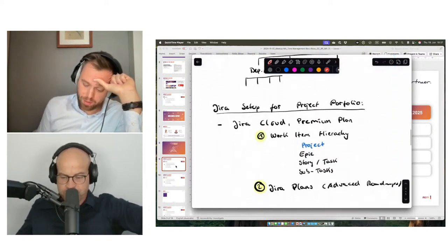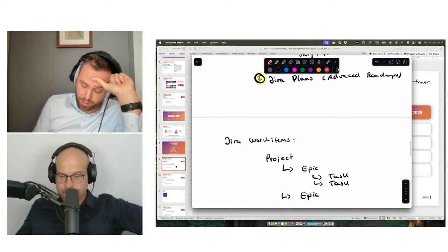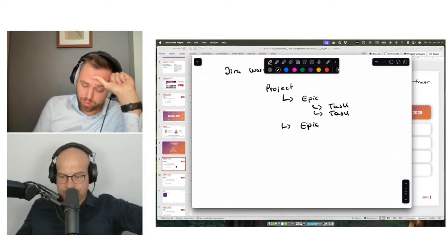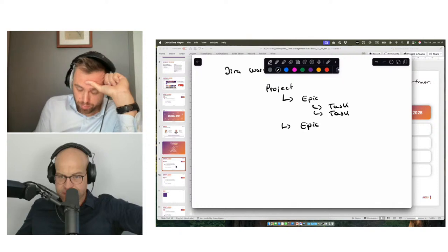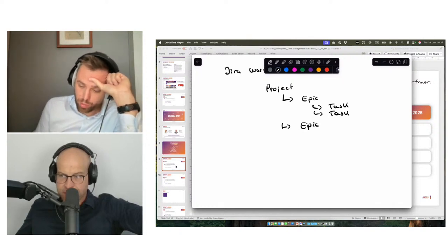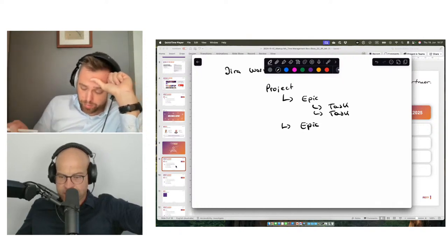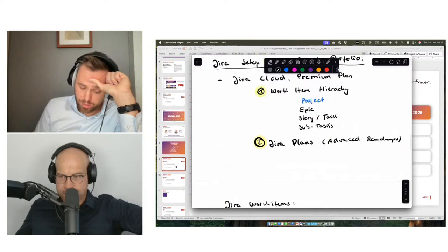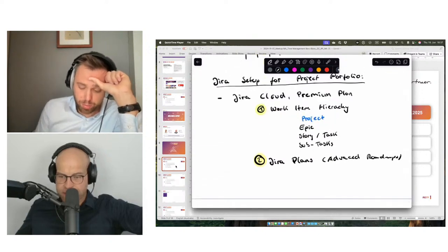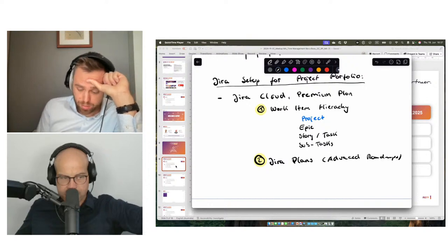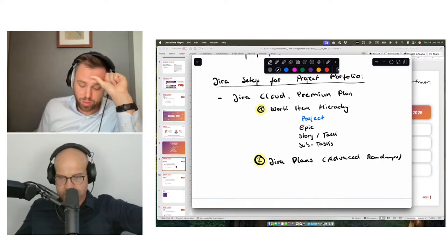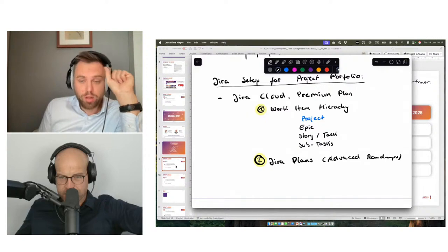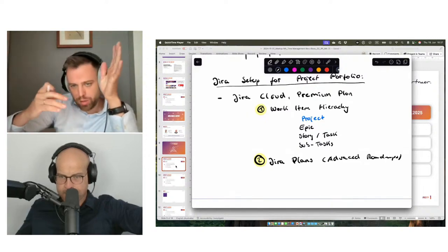Roman. Okay. All good. Then before, maybe I'd still like to mention product portfolio. We looked a lot into project portfolio now, but before I do that, staying in Jira, what is important if you want to run Jira plain without apps is that you need the Jira Cloud Premium plan. Then you can set up your item hierarchy based on project, epic, and so on. And you can use Jira Plans to show your project and everything underneath on a timeline.